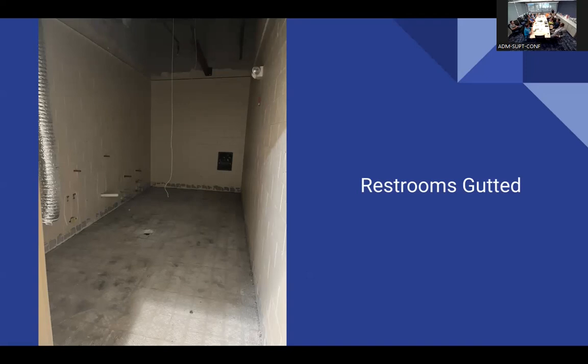Currently that gas service lives inside of the old building. A lot of times gas services nowadays are placed on the outside of the building. Well, we can't tear down the building with a live gas service. As soon as they commit to this, we'll decommission the gas, and our mass demo sub is patiently waiting because they're itching to get going. We started this process back in April. Do we have a tentative date yet, Luke, from them?